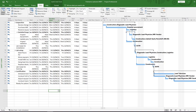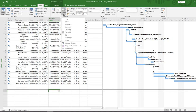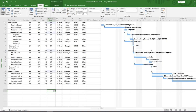The next thing we're going to look at is updating our schedule. When your team starts working on their assignments, you have to start recording actual values in the project — otherwise the plan is just a poster on the wall. In this example we're going to update tasks rather than assignments, so we have fewer updates to do. We'll use the Tracking table: click the View tab, go to Data, click the Tables drop-down, and select Tracking.